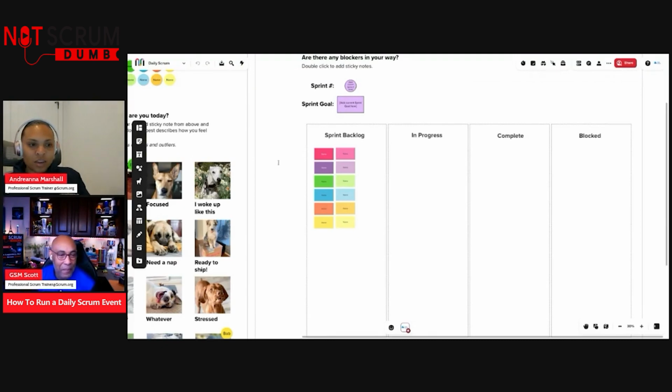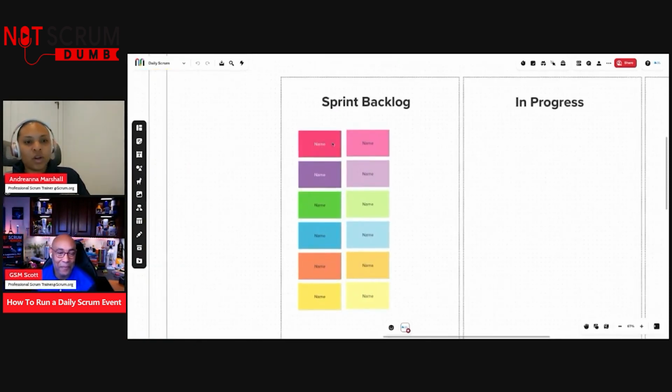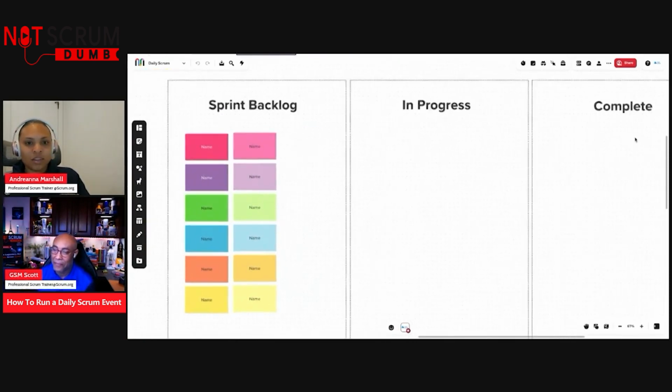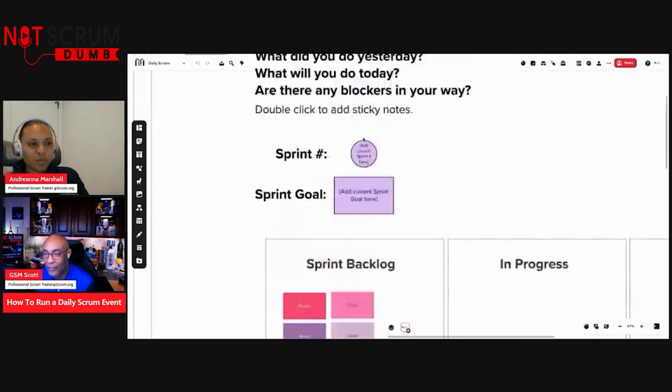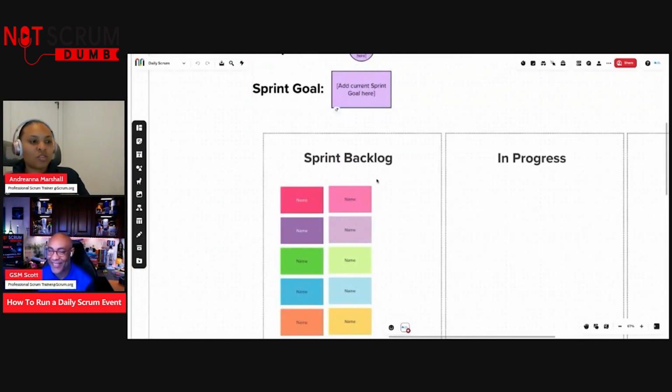Another way, which is common, but sometimes I'll notice that teams will go to round robin. They don't like it, but then they forget, why don't you just walk the board? We're going to talk about relevant things towards your progress. We're talking about, this is our task one. Maybe it's in progress. Maybe it's complete, when we're talking about what we've done or what we've completed toward our sprint goal. Focusing on the task level, everyone should be working toward our sprint goal, and that's a whole different conversation if they're not.